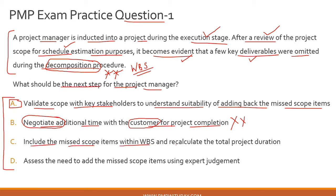Option C says: include the missed scope items within the WBS — which links back to this decomposition procedure — and recalculate the total project duration. This links back to the logic we provided for option B: with this exercise, where you include the missed scope items and calculate the total project duration, you now have a definitive answer as to whether the project is on track, off track, or highly off track with respect to the baseline schedule. So in option C you are basically doing an assessment. This looks like a good option; let's hold it for now.